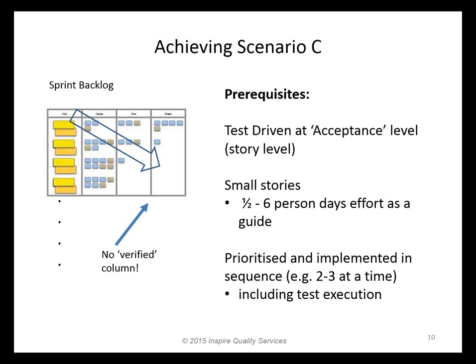The first task I think that should come on the to do list for a product backlog item should be define the test tasks, because they will help prevent defects. They will help clarify the requirements. The developer, the programmer, the designer will understand what tests have to pass when they start to implement that story. And of course, in terms of integrating tests through the lifecycle, it means testing is happening right at the start of a sprint rather than coming along halfway through.